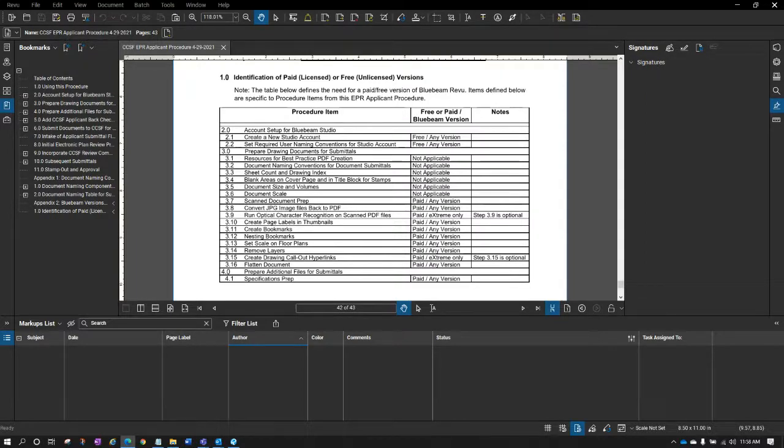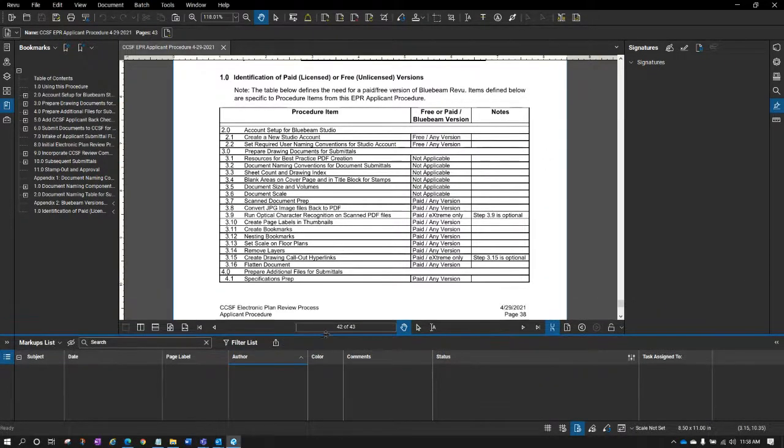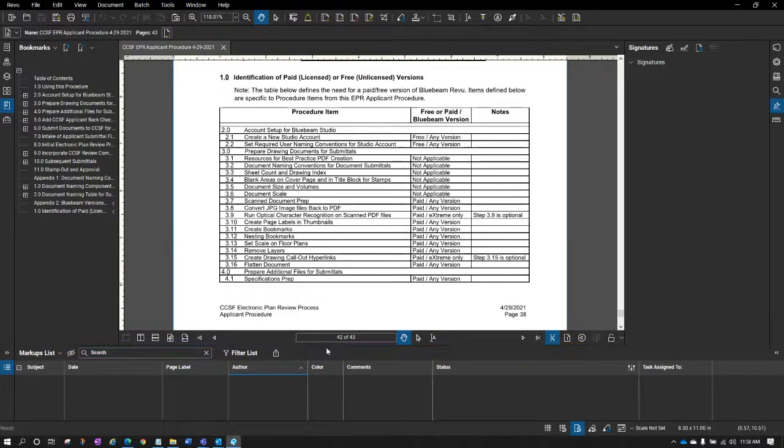And then number two, basically the answer is no, unfortunately. The design team cannot add corrections directly into the set. They have to submit a Rev 2 version. We were kind of experimenting with allowing that, but I think we're not going to allow that. There must be a subsequent submittal. So the answer to that one is no as well.